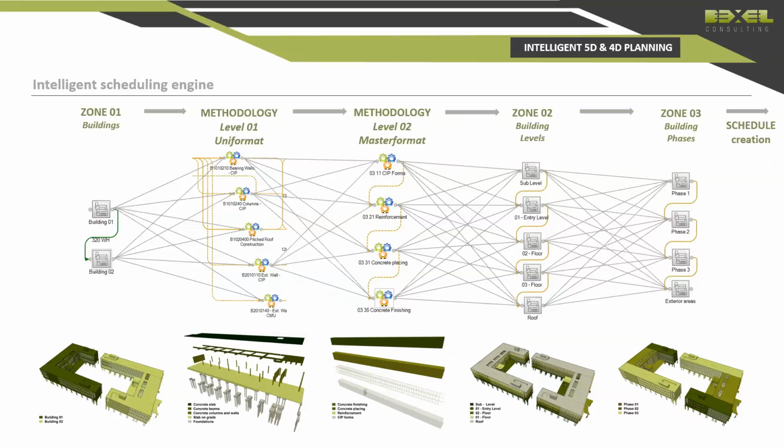And the clients actually want to have the schedule or some kind of presentation of how the construction will look as soon as possible, even if they don't have the full cost analysis. In that case, you can also create methodologies without the price. I mean, you can still have your classification without the price, and you can still use these kinds of items to create your tasks for the schedule.